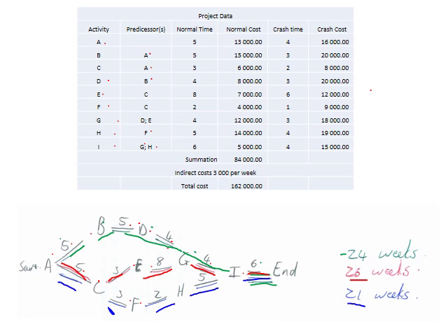From that we can calculate our cost per item. So that's what we use that for. So we take 3,000 and we times it with 26, which gives us 78,000 plus the 84,000, that's 162,000. Everyone I think got to that point.